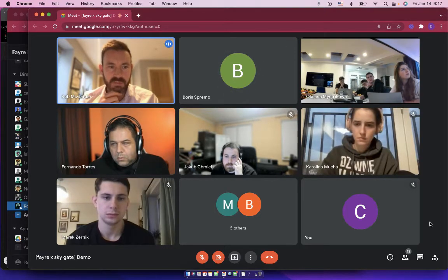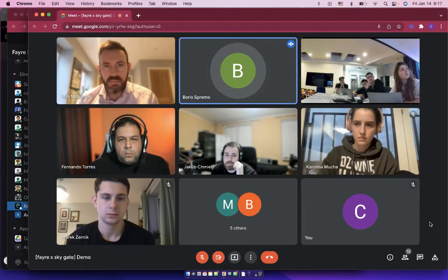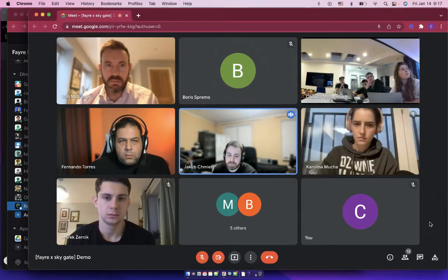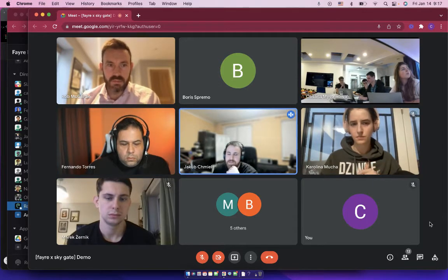It needs some sort of formal process. Right now it's comments in the cards, which is okay. But eventually it would be nice to have separate cards for bugs, because what we are doing right now is moving huge tasks, like 'as a user, I'd like to sell an NFT', back to in progress only because of minor stuff. So it would probably be better to have separate tasks for bugs, like in Jira.